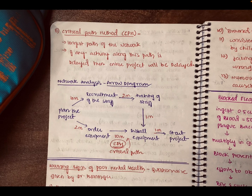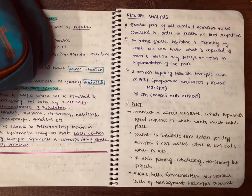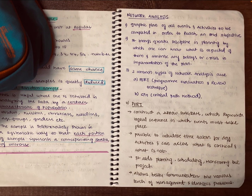This installation activity takes the longest time, making it the critical path. Our end goal is to construct the hospital within one year, and this critical path takes 10 months — the longest part of our network analysis. In the meantime, we plan other smaller activities: recruiting the staff takes four months, and training the staff takes two months. These run alongside the critical path, after which equipment is installed and the project is completed.